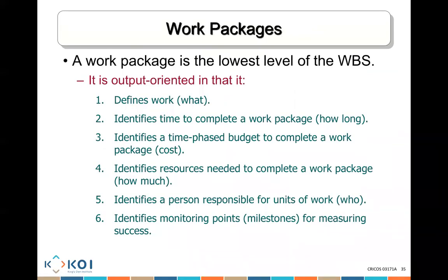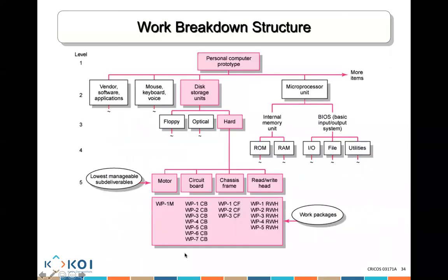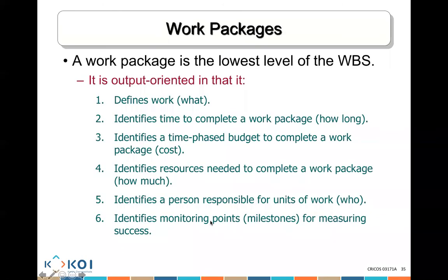Now, a work package is the lowest level point of the work breakdown structure. That's really the lowest, and that's the one that consumes time, and that's the one we assign people to go and do. It is output oriented. So it is about ensuring: what do I need to do? How long do I have to do it? How much in terms of resources do I need? How much in terms of the budget do I need? Who is going to actually do it? And what are the monitoring points? How am I going to ensure there is a milestone available for us to ensure we are delivering the right outcome?